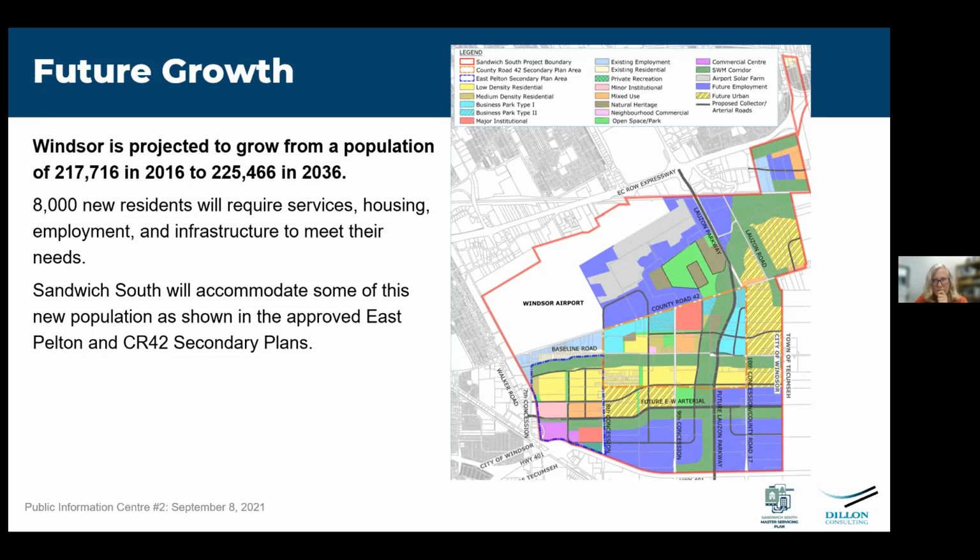Sorry, yeah, maybe, Carla, do you want to take it? I was just going to say, let's put a pin in this. Let's call complete being the point in time where it's the 30-day review period. So Patrick, is it reasonable to say that the aim, subject to things changing, is to get the 30-day review period started before the end of this year? I think Mr. Ballas is just trying to understand when complete is. What is defined by completed project? That's what I would like specifically outlined. Yeah, so satisfying the requirements of the EA in terms of public consultation and coming up with preferred alternatives. Our intention at this point is to do that before the end of the year. We'll notify everybody with an updated schedule as we progress here.